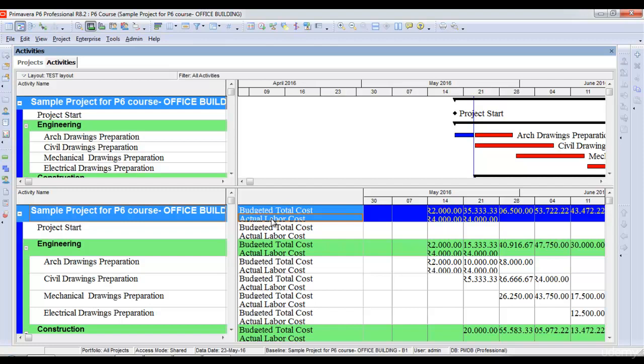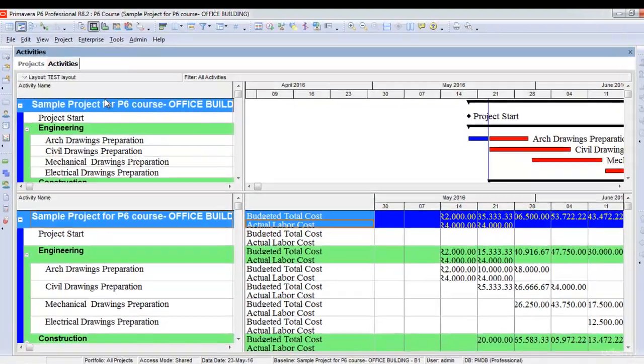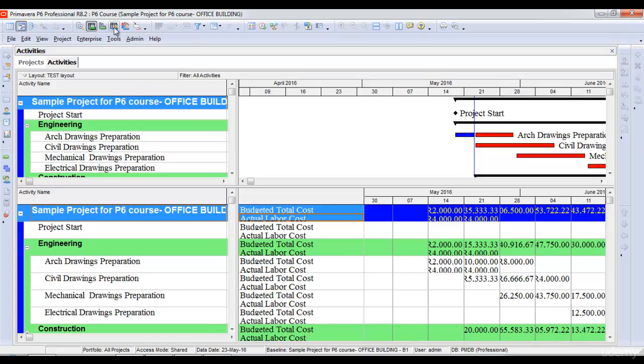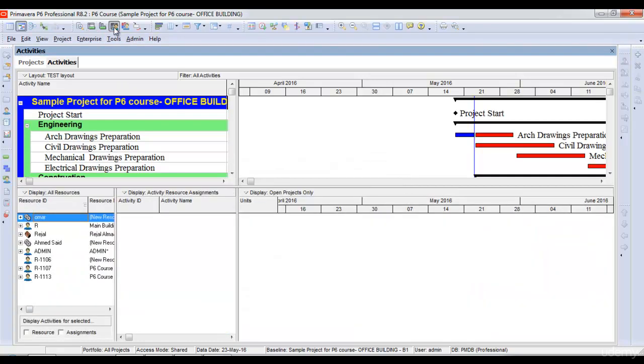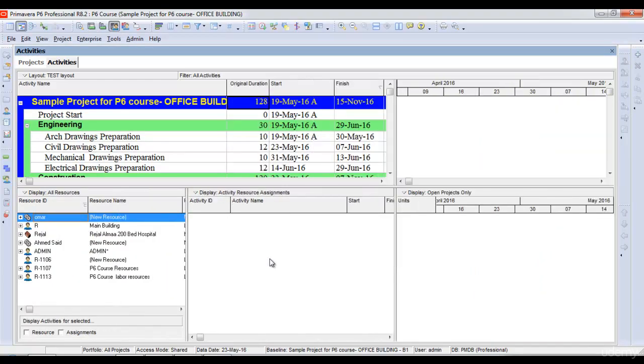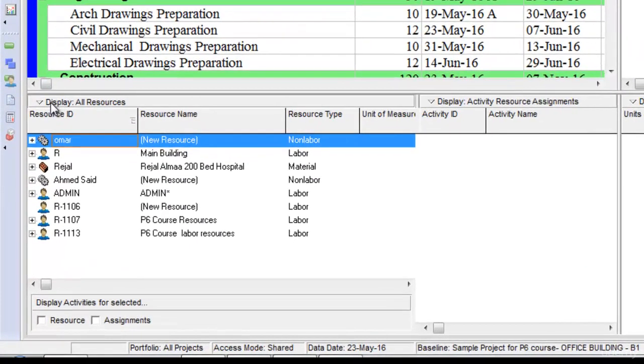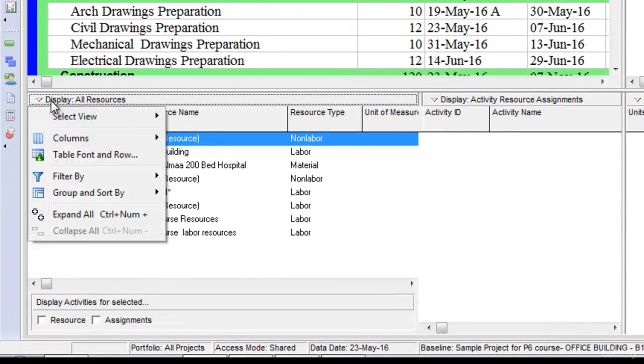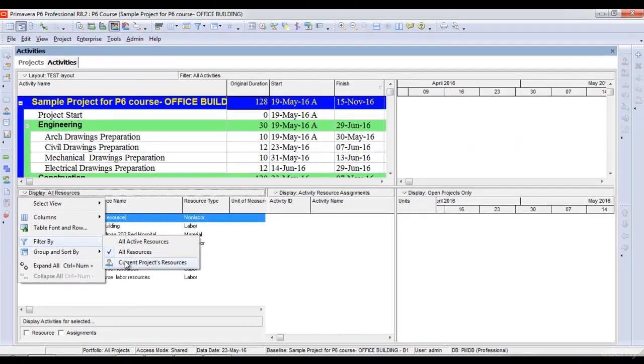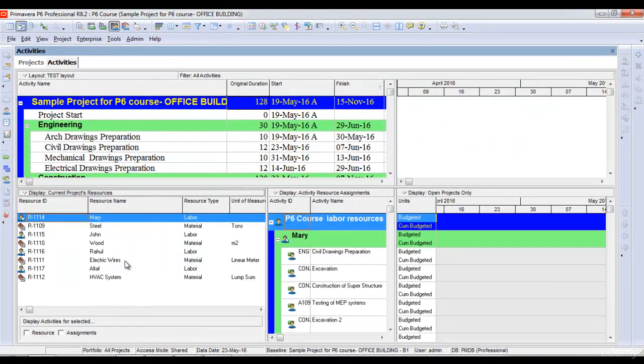Now let's have a look at the resource usage spreadsheet. The resource usage spreadsheet can be opened from the resource usage spreadsheet icon here. Once I click the icon, it opens the resource usage spreadsheet in a similar way as it opens the activity usage spreadsheet. I'll click display here and then filter the resources of this project only.